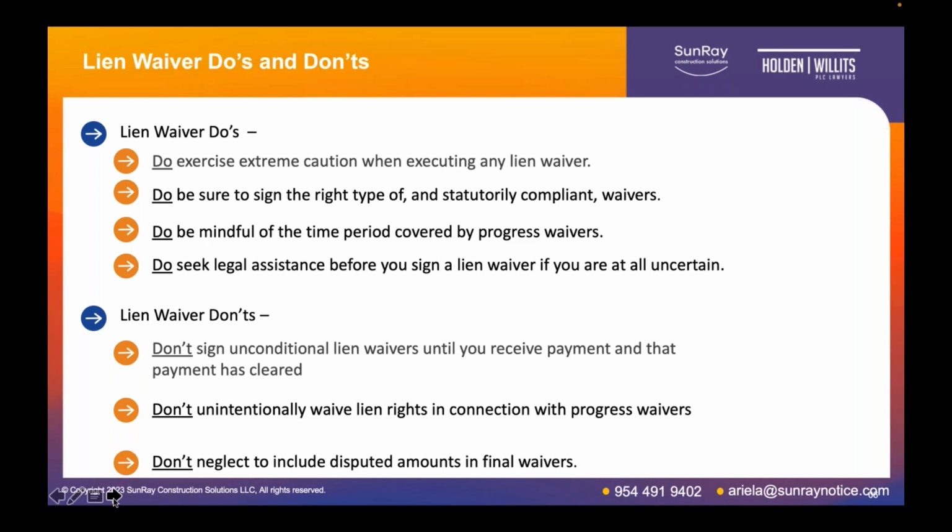And if you got payment for that September waiver and you've waived lien rights through that certain date on the project in September, you're going to have a problem for that unpaid work in August. So in certain circumstances, you got to be careful with through dates, and that may be one of the circumstances where you may want to modify the waiver that you're furnishing, because you can get into a real issue of waiver in that circumstance.